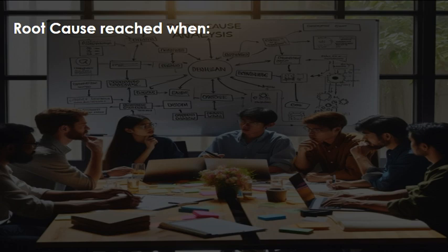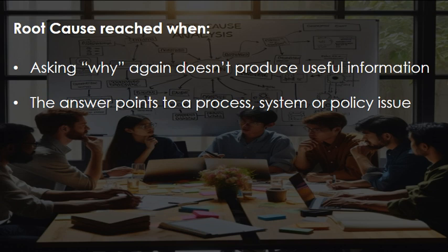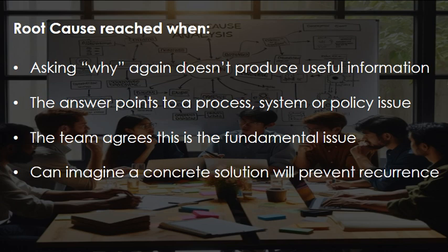You know you have reached the root cause when asking why again doesn't produce useful information. The answer points to a process, system, or policy issue. The team agrees this is the fundamental issue. The team can imagine a concrete solution that prevents recurrence.